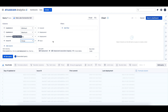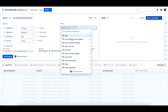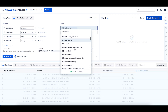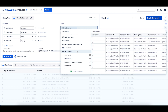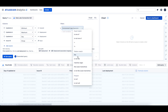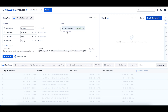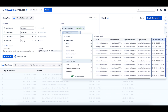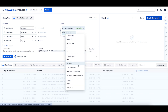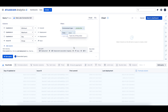Because we only want to see successful deployments to production, let's add two filters to our query. For the first filter, let's add the environment type column from the deployment table, select the equals filter operator, and type 'production.' For the second filter, we'll add the state column from the deployment table, use the equals filter operator, and type 'successful.'